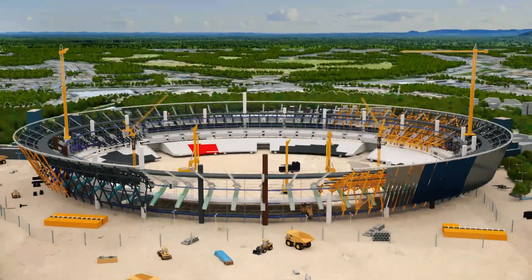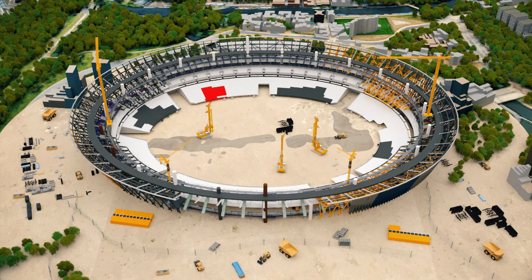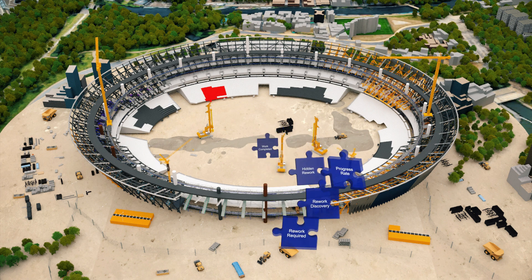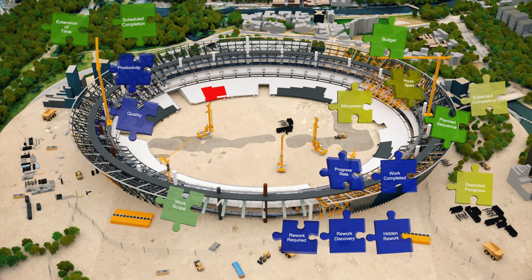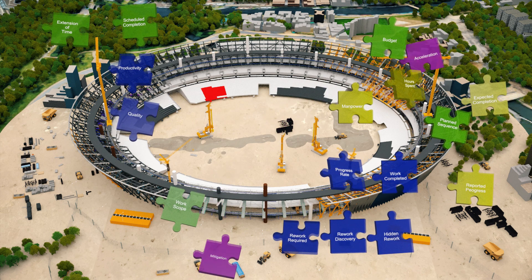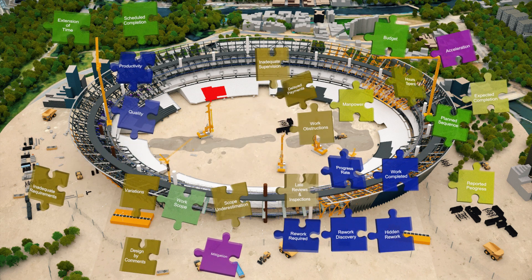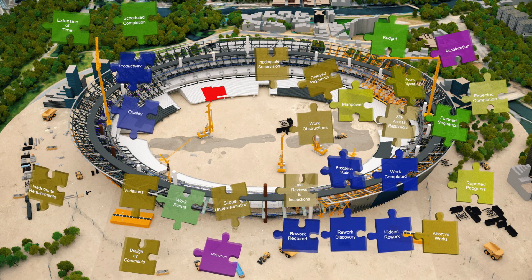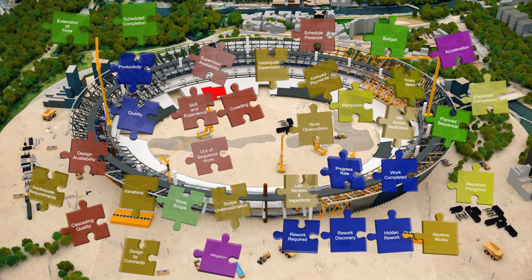So if you now want to successfully claim for the disruption the employer caused, you will need to extract order out of chaos and make sense of a lot of different pieces of information. You will need data about the basic characteristics of your project, about its actual performance results, and about key management decisions. You will also need to know about the major disruptive events that occurred, and about the different ways in which inefficiencies can arise in a project.